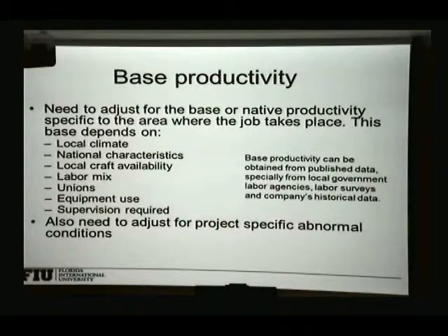The base productivity also affects the time that it will take labor to convert that material into the final product. So we will basically use the labor productivity out of the RS-Means book or the database that we have. So if they say it's going to take you 5 hours to put together 500 square feet of roof, then that's the number we're going to use.